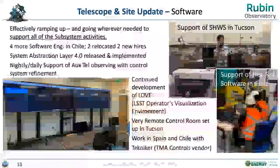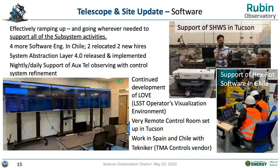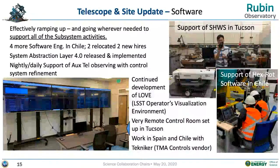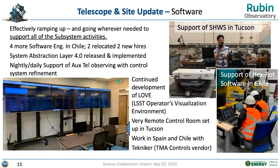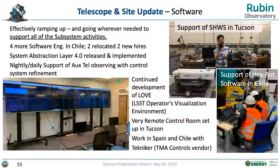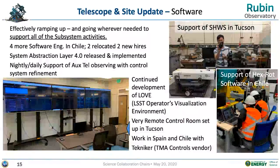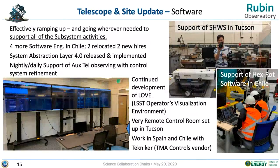Software systems on the telescope and site continue to improve. The System Abstraction Layer (SAL) has a stable release that's fully implemented and being deployed across the entire suite of subsystems. One issue we face is that some software developed by vendors used a previous version of the SAL, and since we now own those software deliverables, we are having to update them to current versions.